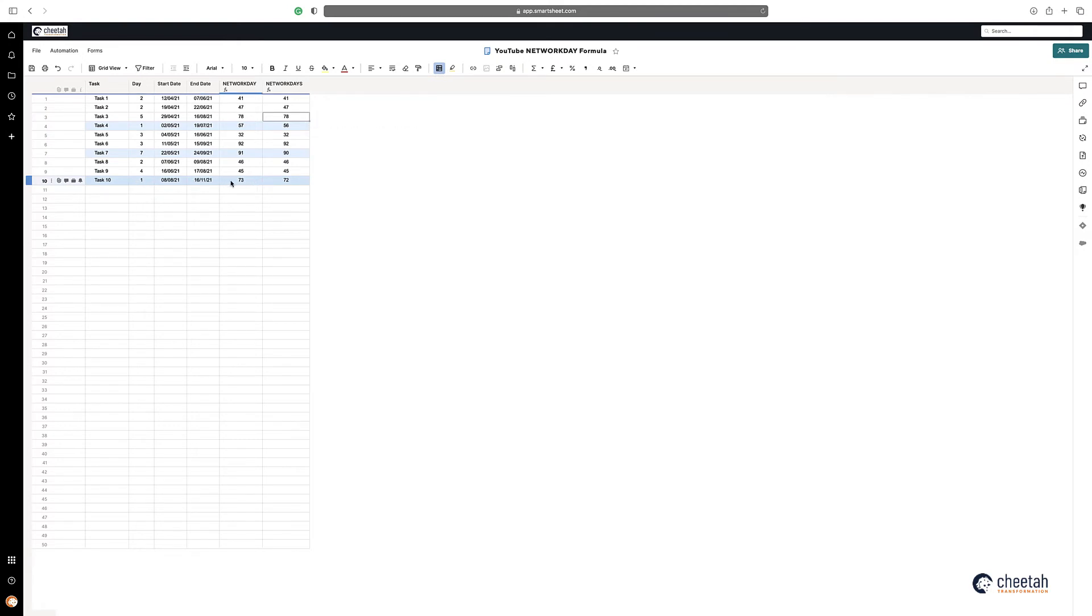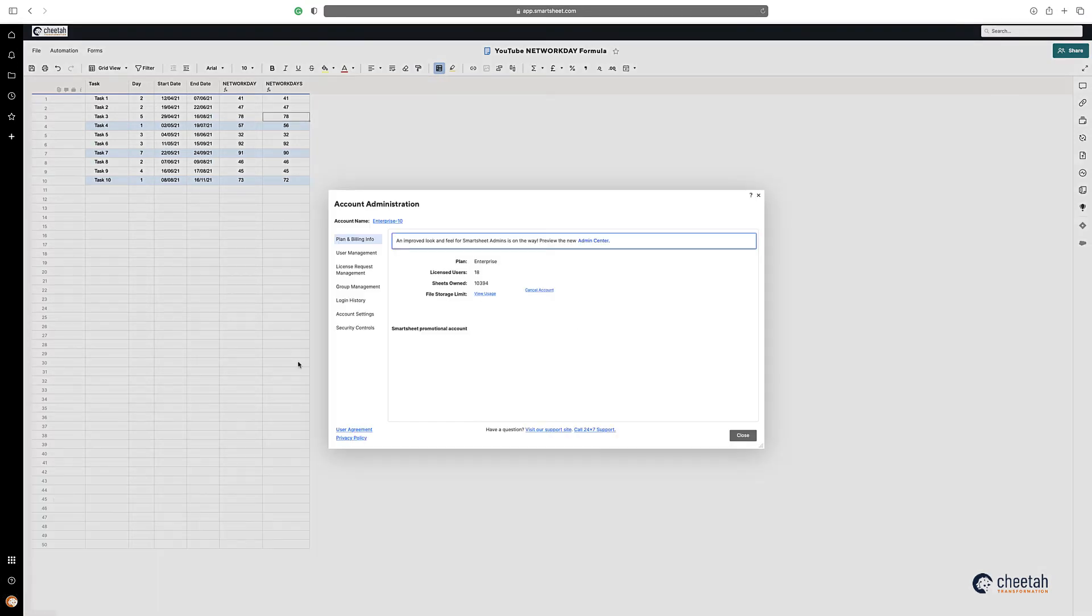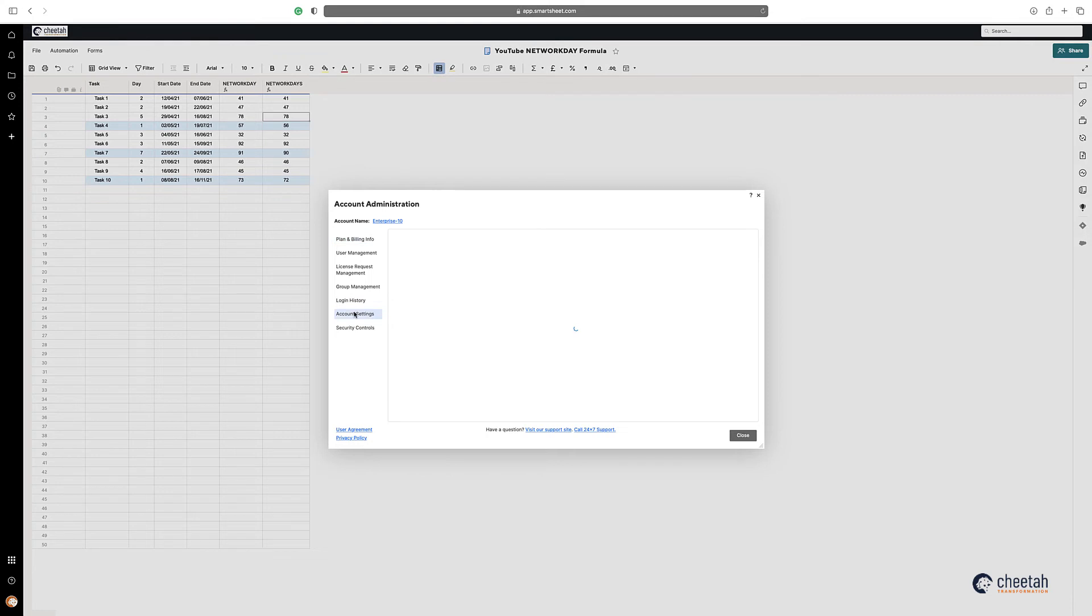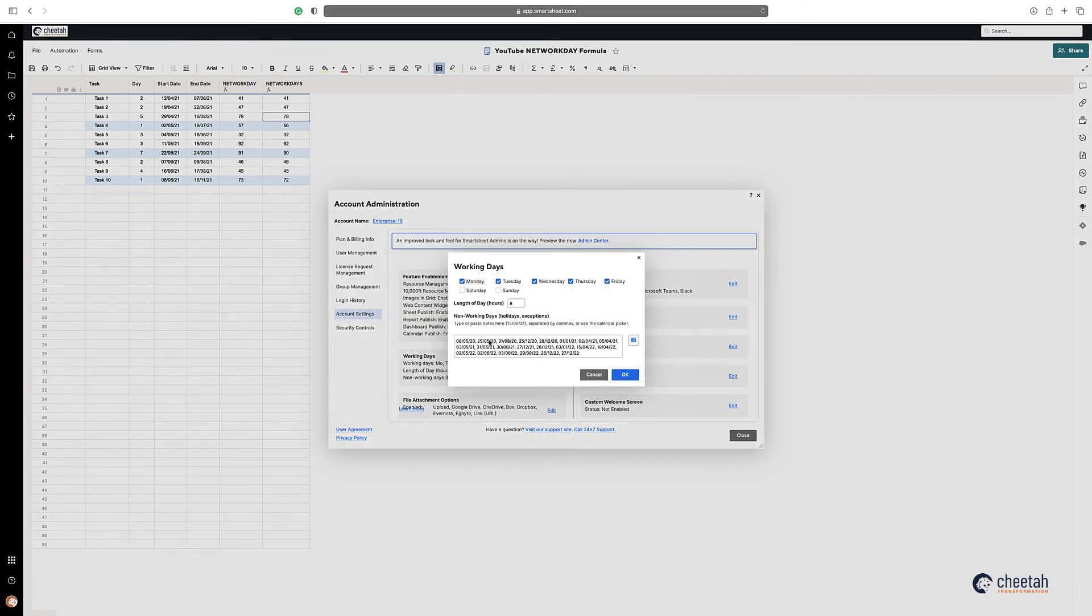Now the good thing about NETWORKDAY is that if you go into your account settings here, if you go into Plan and Build, and then into Account Settings, and then Working Days here, you can see that you can specify the number of days. Now you have to be sysadmin on Smartsheet to do this.